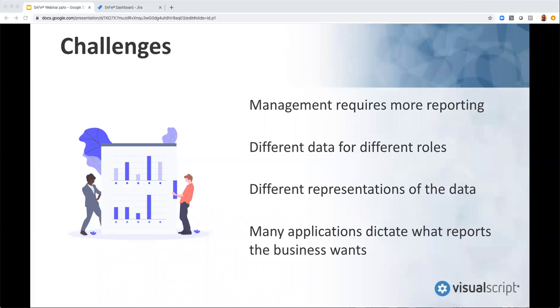So there are many common reports and tools that are needed for organizations working in Essential SAFe. Product and feature roadmaps can be used as reports and planning tools. They are used to identify which team or teams is working on which features and in what PI. A program or PI board is used to understand which team is working on what stories in what sprint in a PI. Dependency reports help map out and visualize dependencies of features and stories. A program velocity report measures velocity for each team and for the entire Agile release train.